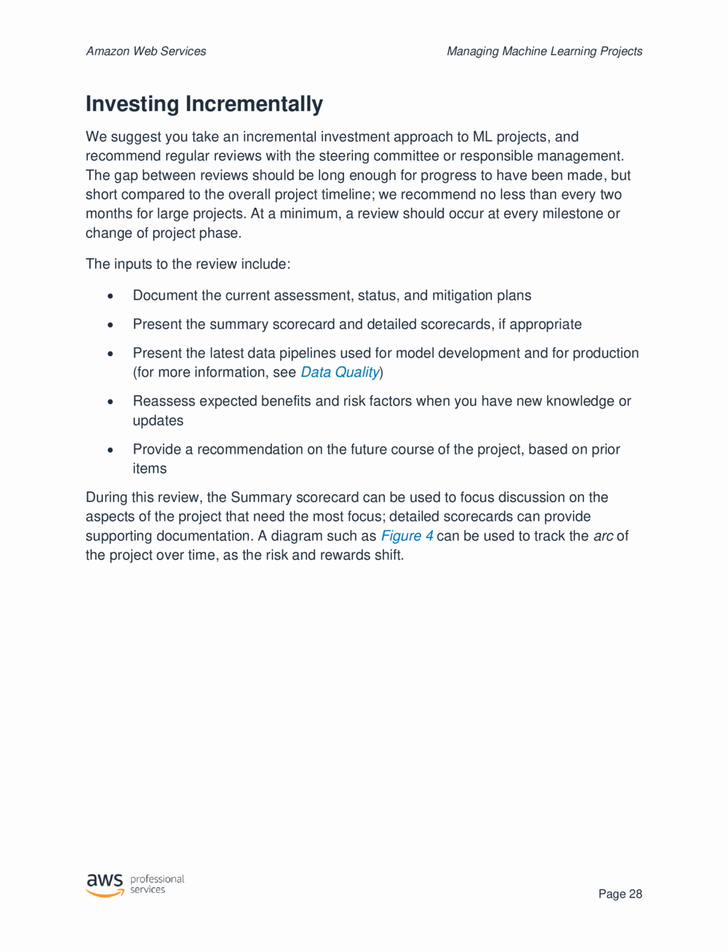Investing incrementally. We suggest you take an incremental investment approach to ML projects, and recommend regular reviews with the steering committee or responsible management. The gap between reviews should be long enough for progress to have been made, but short compared to the overall project timeline. We recommend no less than every 2 months for large projects. At a minimum, a review should occur at every milestone or change of project phase.